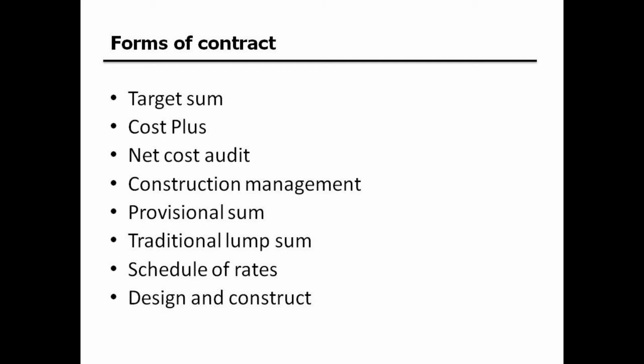So consider construction management, which is where an organisation, often a builder, enters into a contract or a relationship with a building owner, and this relationship is probably similar to any other key consultant on the building project, like the architect. The construction manager is paid a fee. The project's fully designed, but at a staged process. So there's delayed letting of trades and materials on this type of contract.